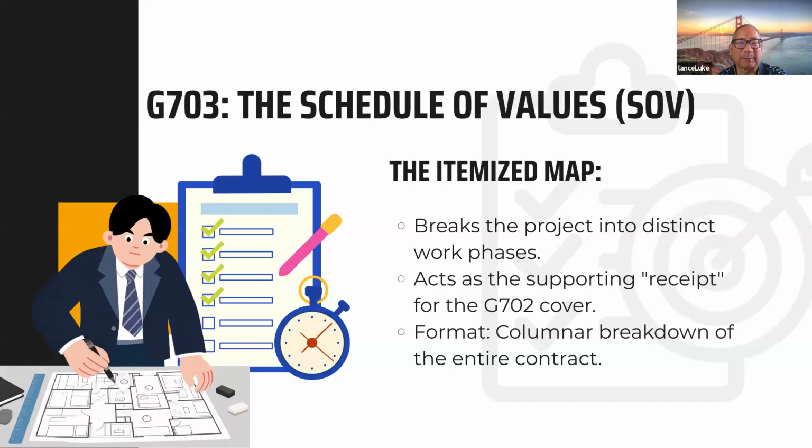Okay, so basically, in simple terms, that's just one line item, and then you go by the next item. So in the first billing, there's probably zero amount for plumbing and electrical because that work didn't start yet. Okay, so it's mainly the concrete slab, and then once the slab is built, then your rough framing comes in. So then there's a percentage being billed every month for rough framing, and then the roof, and then you get to electrical, plumbing, and so forth. So basically, that's the whole procedure on the schedule of values.